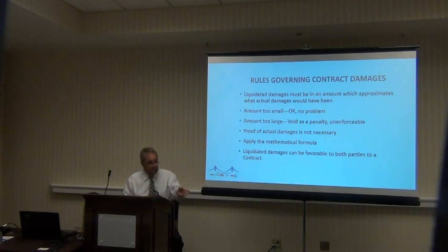So now we're back to the NFL stadium question. A liquidated damage amount for failure to get an NFL stadium finished and ready for play is probably a whole different number than for a grocery store or a convenience store or even a gas station or some retail establishment or even a hospital or a fire station. Casino. Yeah, casino is thought to be the hallmark of as bad as it could possibly get.